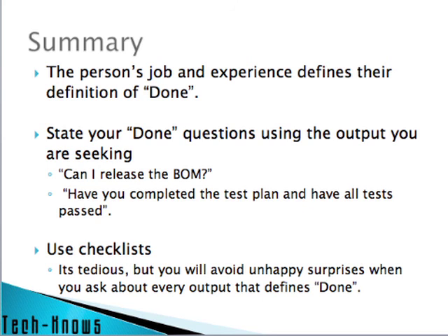It's a bit tedious, particularly to the person receiving a checklist of 20 items they have to say are ready or not ready, but you will avoid unhappy surprises later when you find out that the people are still working on tasks that they told you they were done.